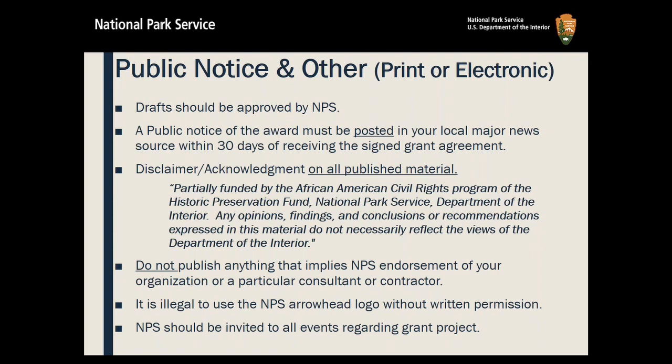All public materials have to include the disclaimer and acknowledgement that you see listed on the slide. And you don't want to publish anything that implies NPS endorses your organization or a particular consultant or contractor working on the project. It's also illegal to use the NPS logo without written permission. And NPS should be invited to all events regarding this grant project. So if you're doing a public notice of a public event, make sure to include your grant manager on that.